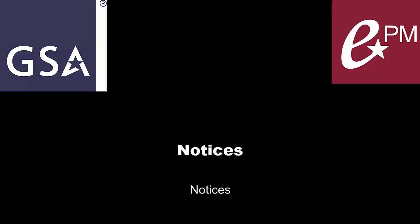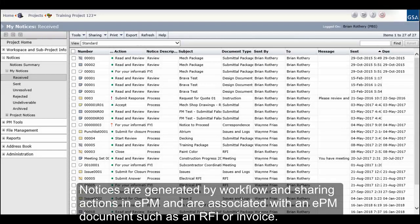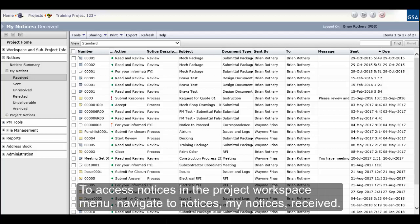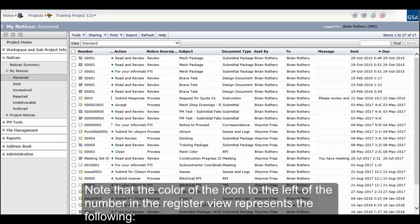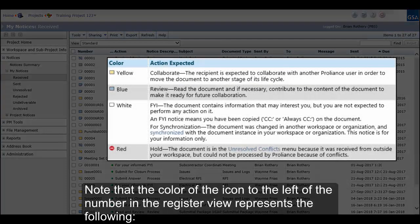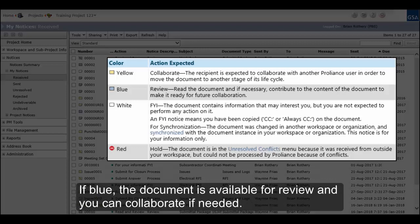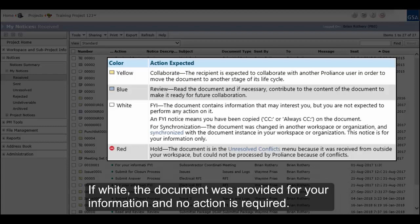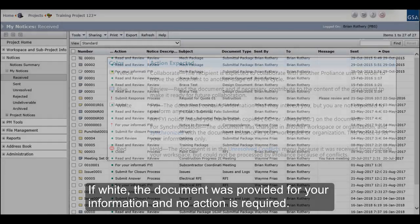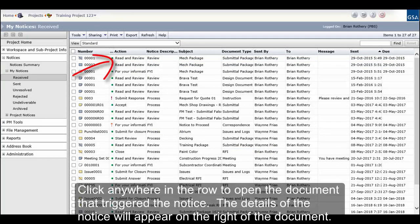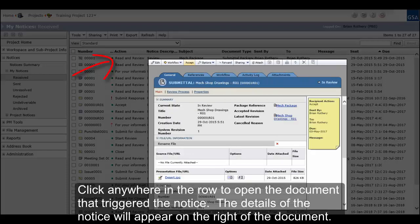Notices are generated by workflow and sharing actions in EPM and are associated with an EPM document such as an RFI or invoice. To access notices in the project workspace menu, navigate to Notices, My Notices, Received. Note that the color of the icon to the left of the number in the register view represents the following: if yellow, you are expected to collaborate on the document — for example, respond to an RFI or approve an invoice; if blue, the document is available for review and you can collaborate if needed; if white, the document was provided for your information and no action is required. In the register, click anywhere in the row to open the document that triggered the notice. The details of the notice will appear on the right of the document.